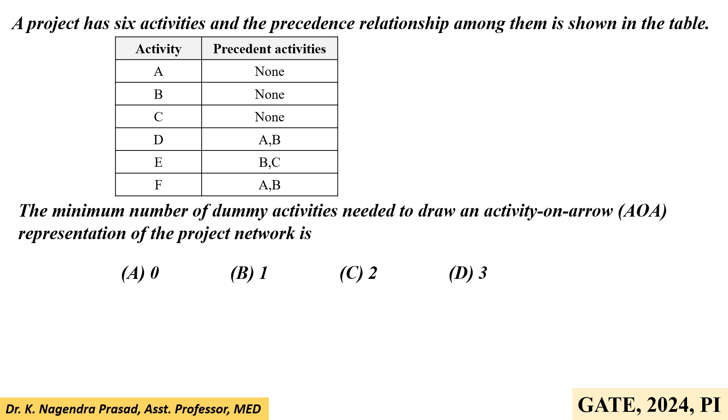A project has six activities and the precedent relationship among them is shown in the table. In the table, it is representing the six activities with precedent activities. The minimum number of dummy activities needed to draw an activity-on-arrow representation of the project network.